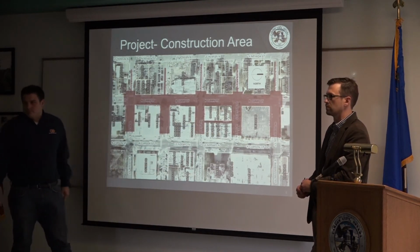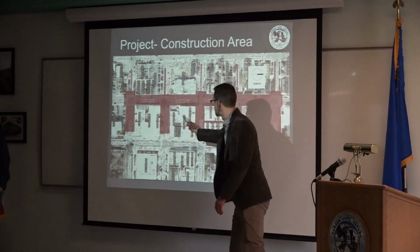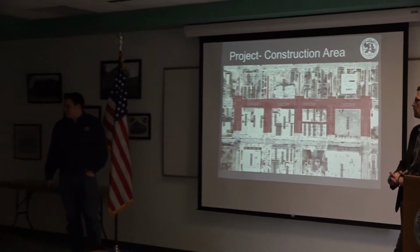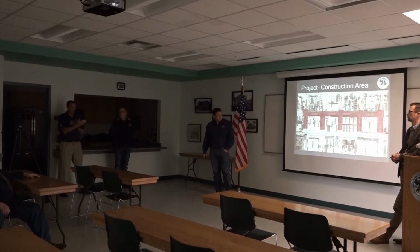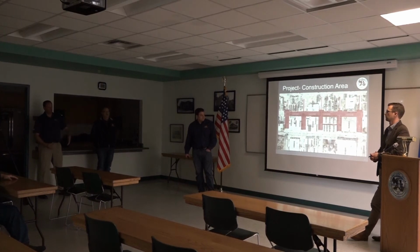Can we change the direction of traffic while you're doing construction, because a number of those are, I think, one way? Three are one way, and Curry Street is one way going north at that point. The difficulty if we start switching traffic is then you start losing parking. We looked at doing that on Carson, when we did the Carson Street reconstruction, and the opinion of the team at that point was that you were gonna lose 10 or 15 spaces, because if it's an eastbound street and you start traveling westbound, you can't do a U-turn within the limits of the street. So already having difficulty with parking on Curry, then we're taking spaces where we're working, and then now you're losing spaces on streets that traffic is running on.